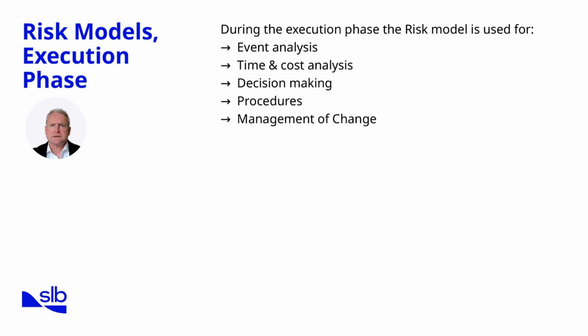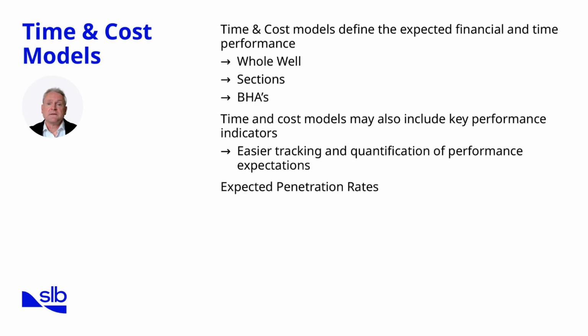With risk models covered, let's now move on to time and cost models, which provide the economic counterpart to this risk-based framework. Time and cost models define our expectations for how a well should perform, both in terms of schedule and expenditure. These models operate at different levels of detail. At the highest level, we can forecast whole well performance, but they can also be broken down into sections or even specific BHAs. By modeling this way, we create a framework that can be tracked and compared during operations.